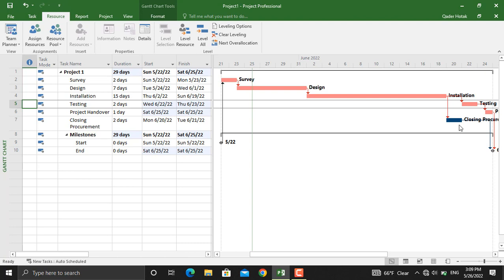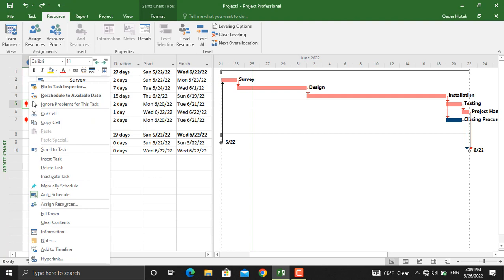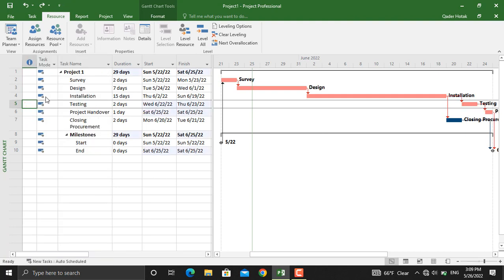I will undo this. As I mentioned earlier, level resources affects the critical path. So if you see the total duration of the project here which is 27 days, if you reschedule this task to another date, this will be 29 days and those icons will disappear from here.